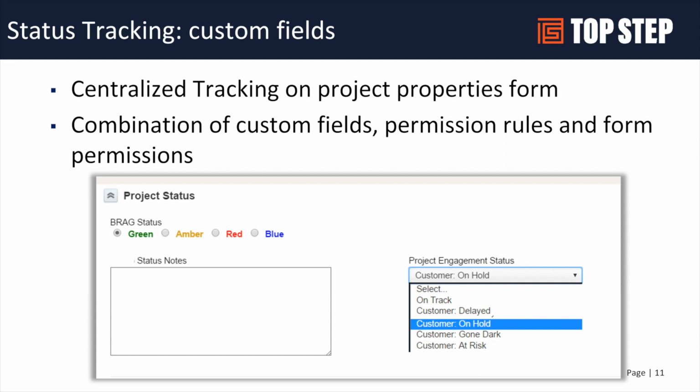And this is really good for me. I can have global visibility of projects. Say, show me any projects that have any of these fields that are yellow or red. You can have reports automatically pulling that data and then schedule those reports. So on Mondays, I get a report of any projects that have been put into a yellow or red state, and then I can see the notes, and then I can go talk to my project managers and determine what actions need to be taken. So again, very useful in being able to manage the statuses and have internal review and updates inside of OpenAir.